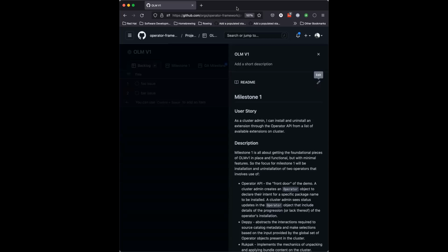Because I really want to do this quickly. I think OLM has suffered from a slow development release cycle, and it's because of forever increasing scope in terms of what needs to be delivered at some point. And I'm just always going to say, do we need this in order to get feedback on something we have decided as a group that we want to deliver? So those are my views.